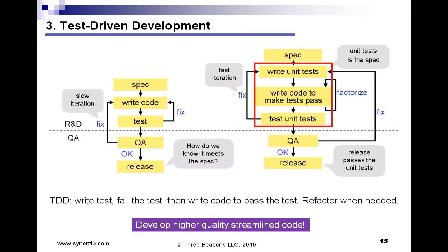I might also mention that you should do a definition of done for your user stories, your sprints, and your releases. Those 3 levels are what you should do a definition of done for. The third tangible technique for preventing technical debt is to use test-driven development, TDD.